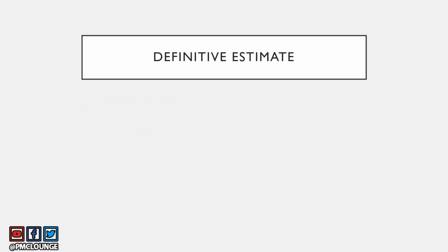Moving on, the final estimate that you can submit as part of your project is the definitive estimate. And standing true to its name, this is where estimates get most accurate. Now you have gone even further. Some more project activities have taken place, have completed, and you have the best knowledge about the project that you have ever had since the beginning of the project.